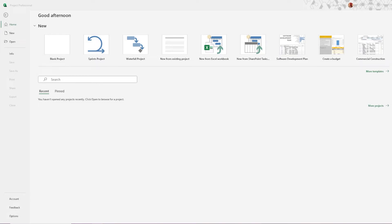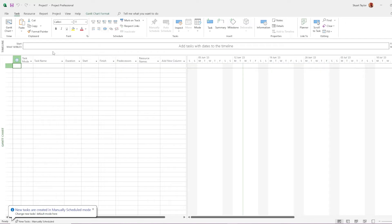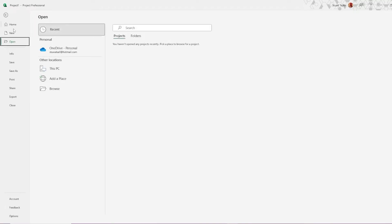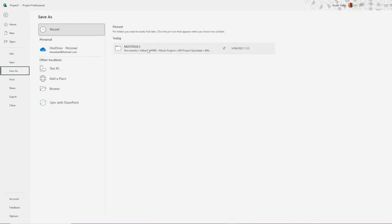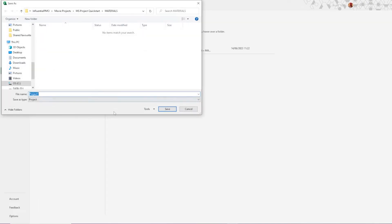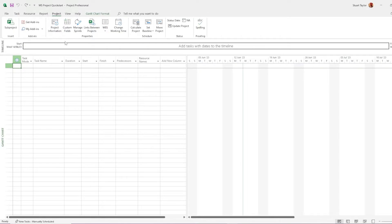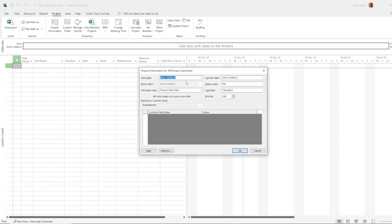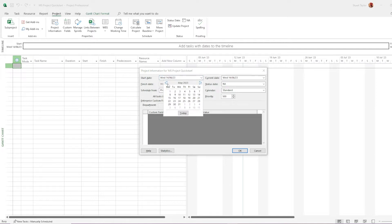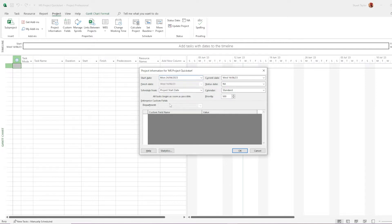Let's start by creating a blank project. Go to file, click Save As, pick your location and save the project. Go to the Project tab and click on Project Information. Select the start date of the project. Make sure that Schedule From says the project start date. Click OK.